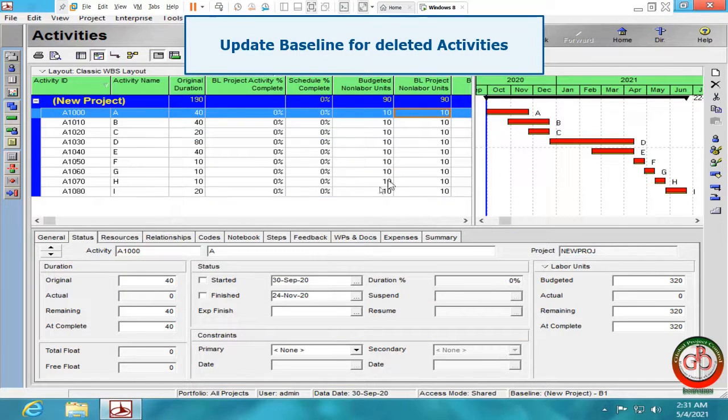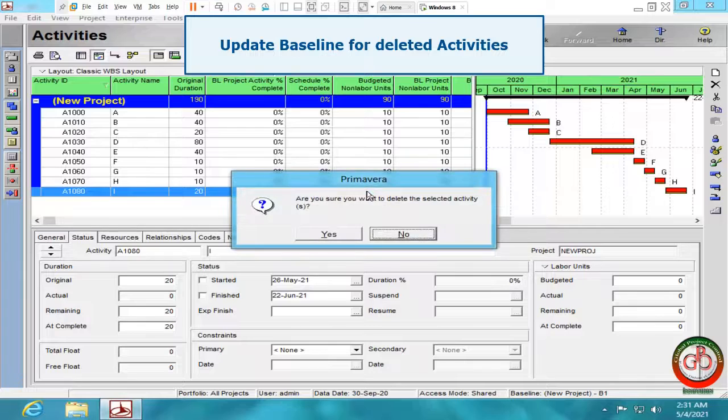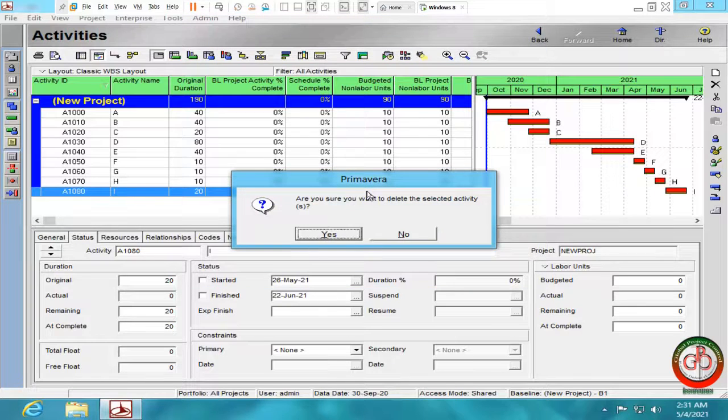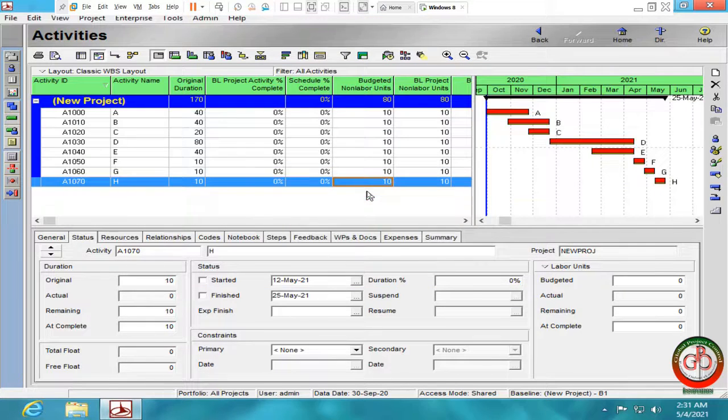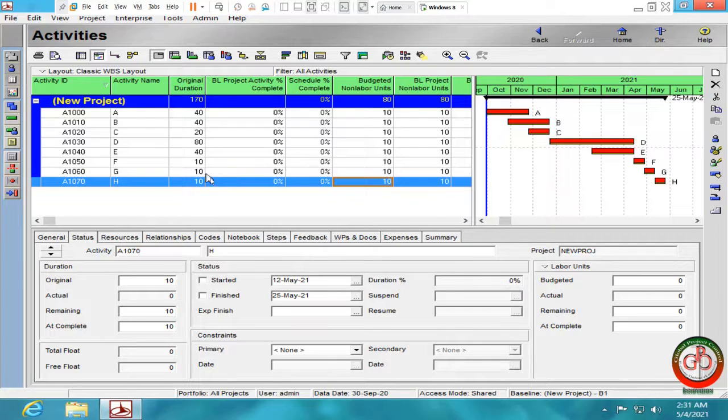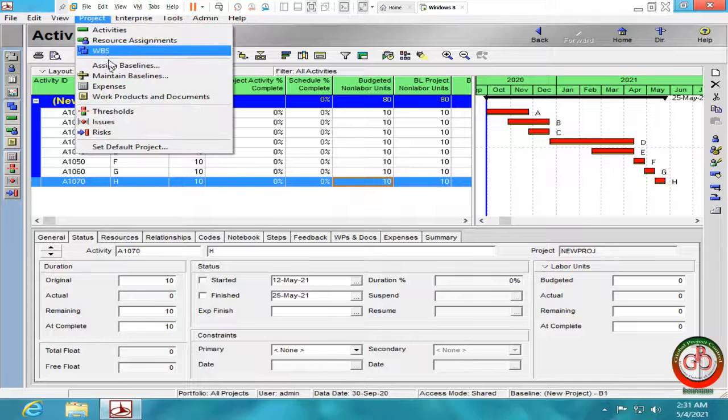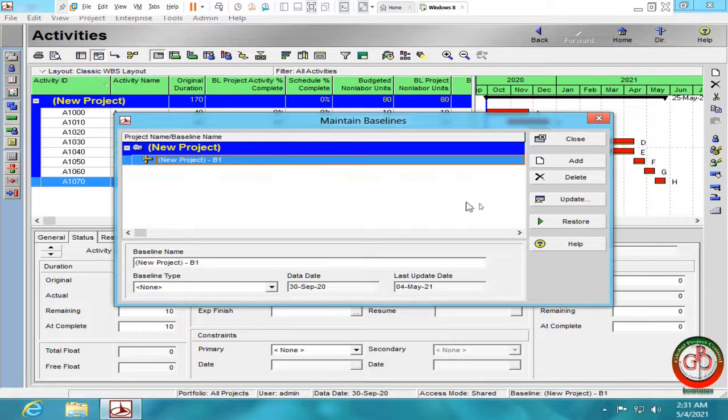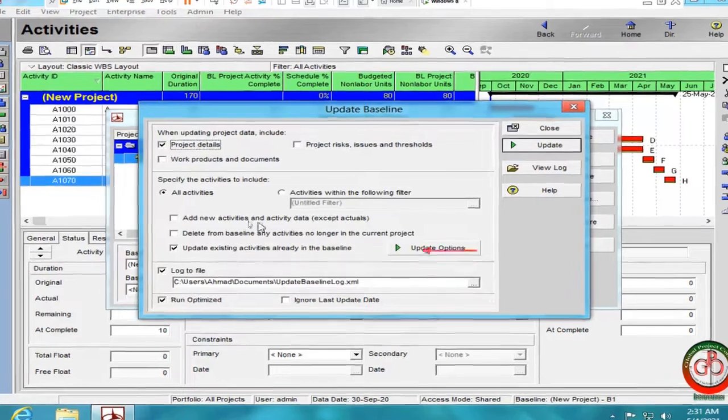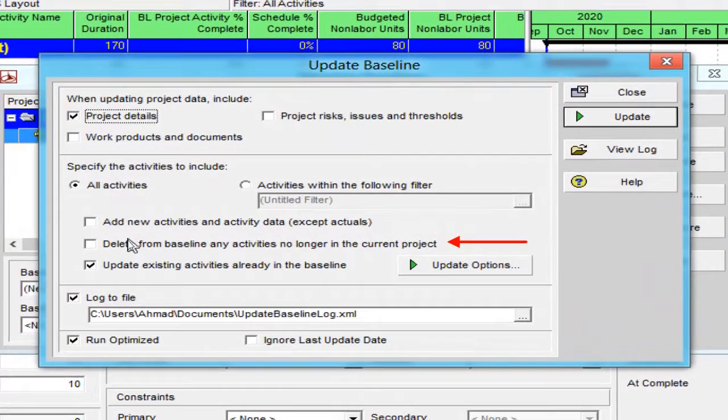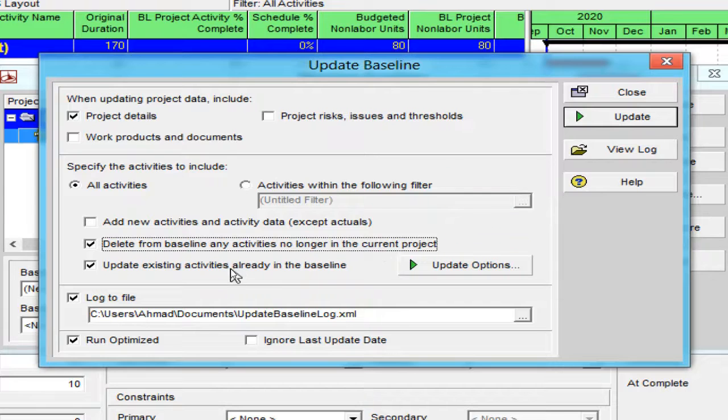But if one of activities deleted from the project, and as a result I want to update my baseline too, I should go to the project, maintain baseline, select the update, delete from baseline any activity no longer in the current project.